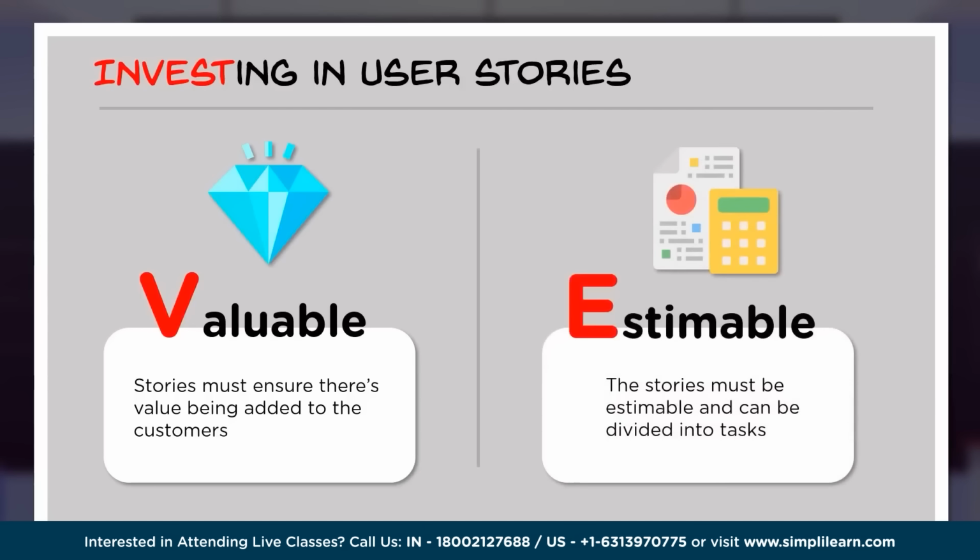So estimable. When we say estimable, one should always be able to estimate the size of the user story. Sometimes developers may not have the experience required to size the particular situations needed for a user story. Reasons may be anything. It may be not having specific insight, or not knowing how to estimate. There may be someone specific who needs to understand those scenarios and then come and discuss. If you cannot estimate a story, it becomes difficult to handle it better. So it should give some visualization, it should be estimable and can be divided into tasks.